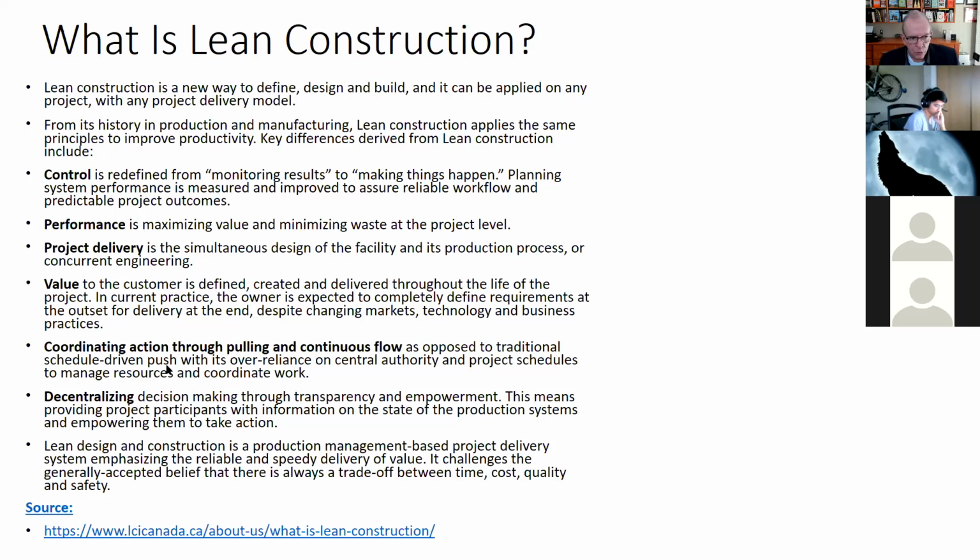What we try to do is have a coordinating action through pulling and continuous flow, as opposed to the traditional schedule-driven push, right? And push is where we focus on the speed of each part. If we can get all of our subtrades to go as fast as possible, then we should be good.